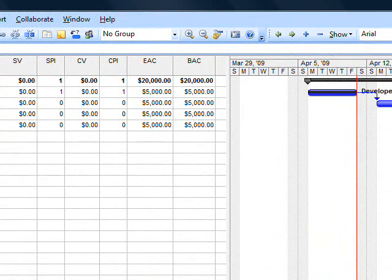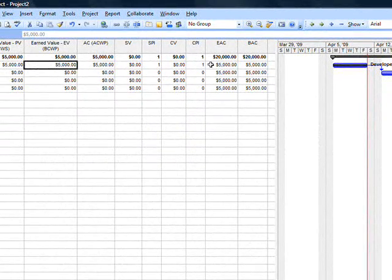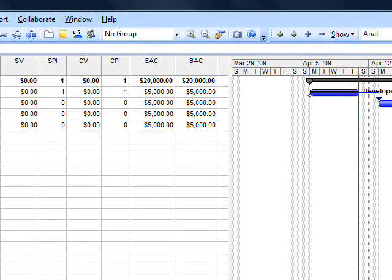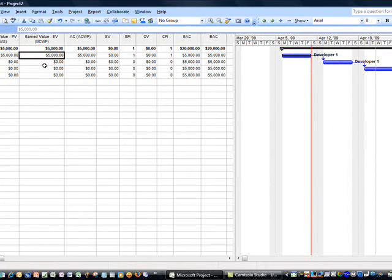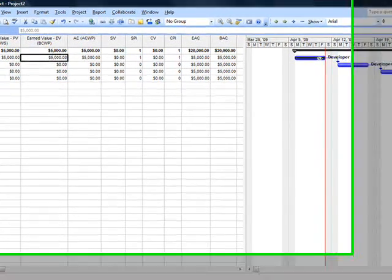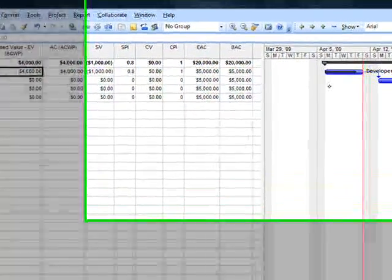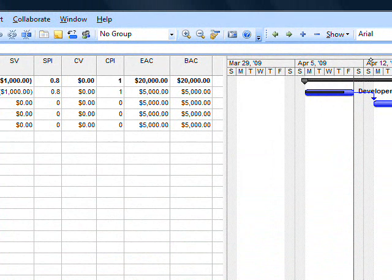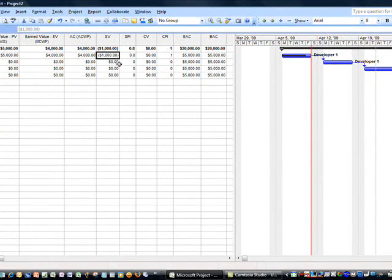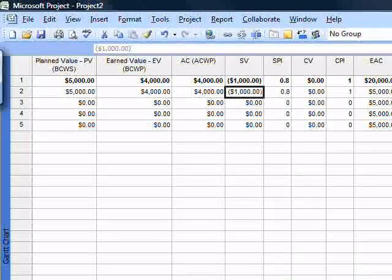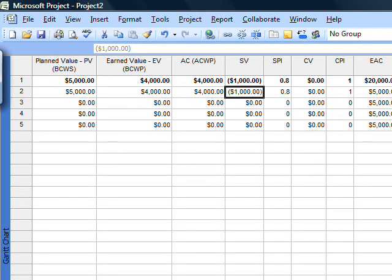This status date on that Friday. These are my earned value figures. What you would expect with 100% of the work done in 100% of the time is that my planned value and earned value are the same. If I were to only earn four days worth at the end of five days, then I'm behind. My earned value is $4,000. Planned value, $5,000. My schedule variance is minus $1,000. Below zero is bad; above zero is good — that would mean ahead of schedule.